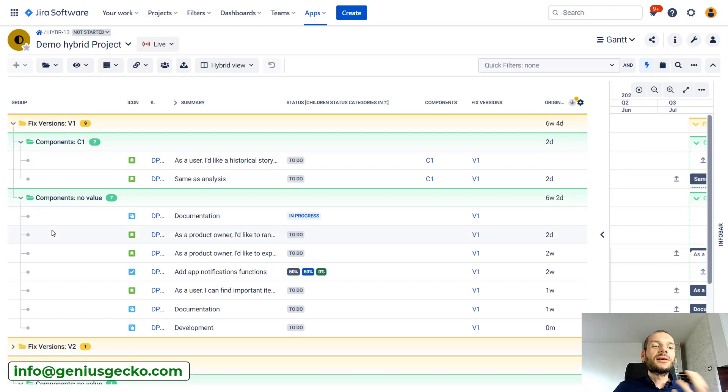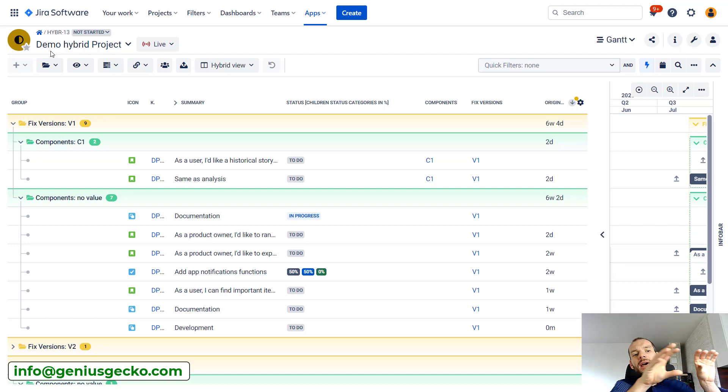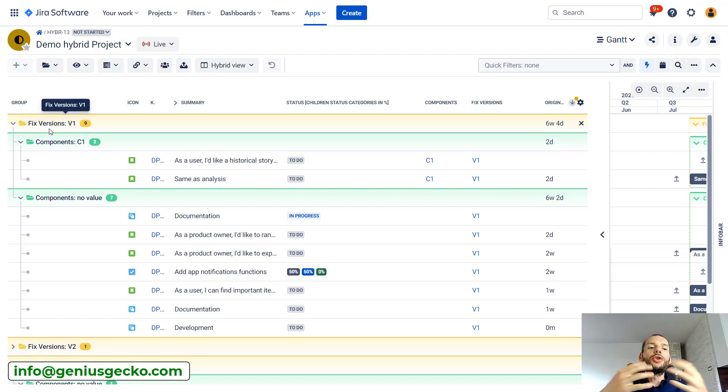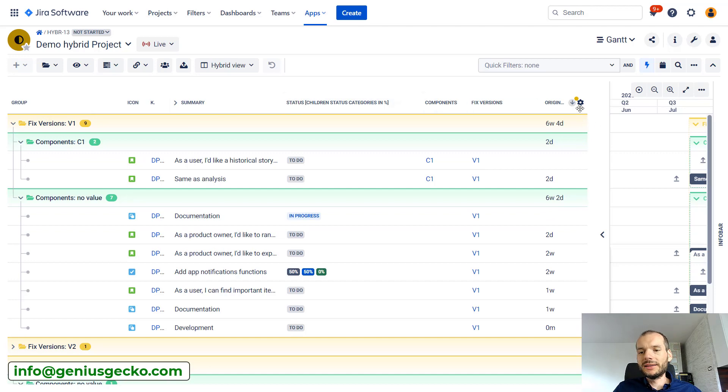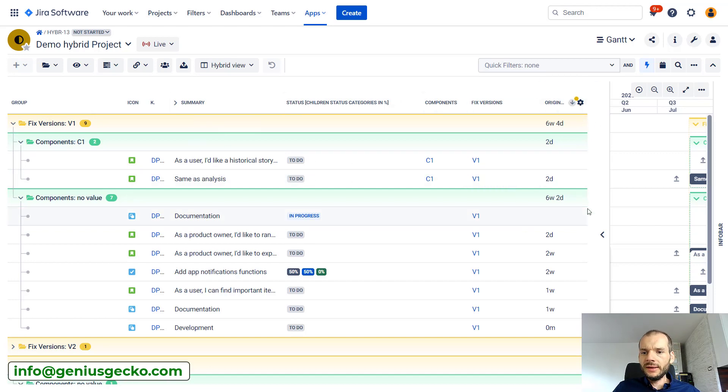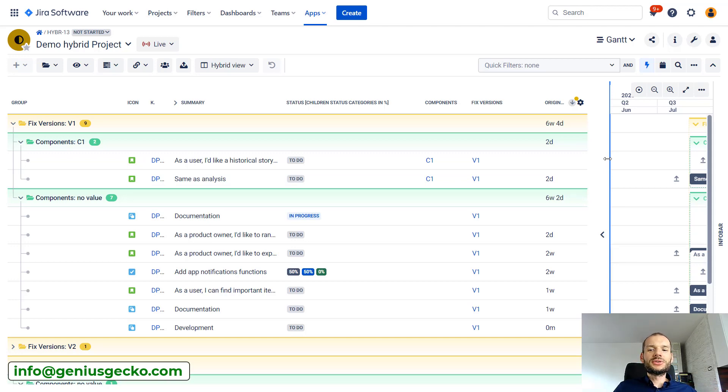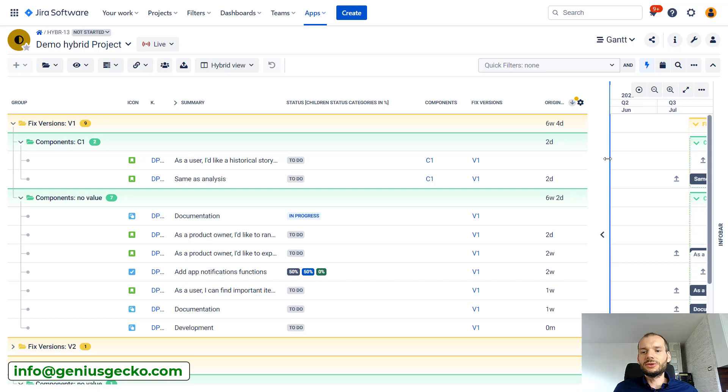The second important thing is that although it may seem like we changed the hierarchy here, it is not the case. Hierarchy is still there in the background - the one that we had previously, so the epics, tasks below them, and subtasks below them. It is just on top of that hierarchy we are displaying these tasks slightly different, basically grouped by the issues that we wanted to. So these were two important things to mention, and this is basically the first use case we see most often used.